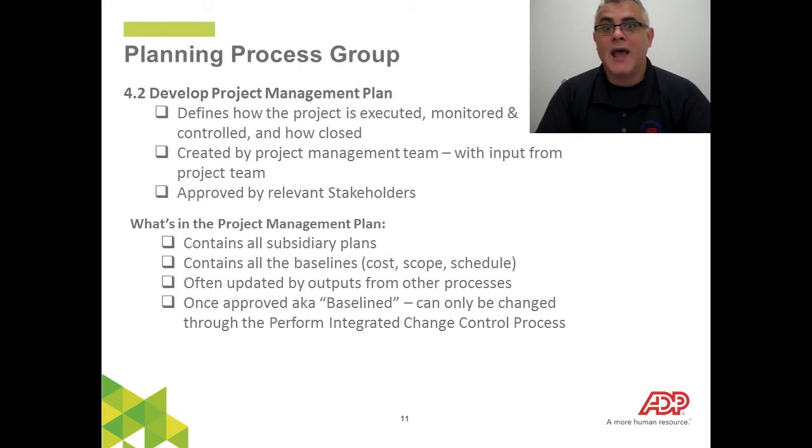In the integration planning process for developing the project management plan, one thing that's important here to know is that you're going to plan and develop the plan for how you're going to manage the project. Okay, so this is where you're going to plot the course for you to be successful in terms of completing this project. How the work is done, what exactly is going to be done, how to handle risks. You're going to outline your baselines for schedule, cost, and scope. And although we haven't touched on cost, schedule, or scope yet, as I mentioned earlier, all those other plans, once you get to them, will roll up. So, you know, really at this point, we're just outlining how we're going to execute this project. We'll later fill in the blanks in our project management plan once we get to those other knowledge areas.